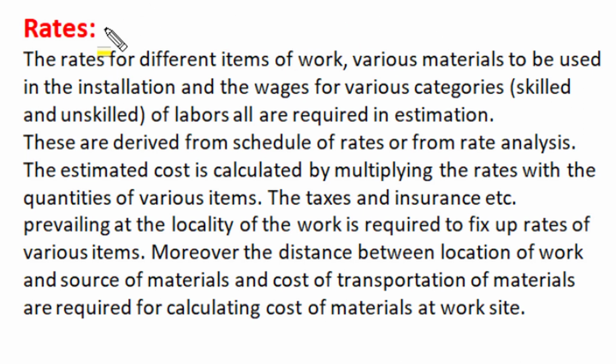The drawing decide the scope of work and used to calculate quantities of different items and work to be performed. Specification decide the quality of those item and workmanship, and rates are the third most important data that is required for cost estimation of any project. In electrical installation, we use various materials, different type of works, and we need rates of all those material and item, and rate is decided as per the specification selected for that particular material and workmanship.